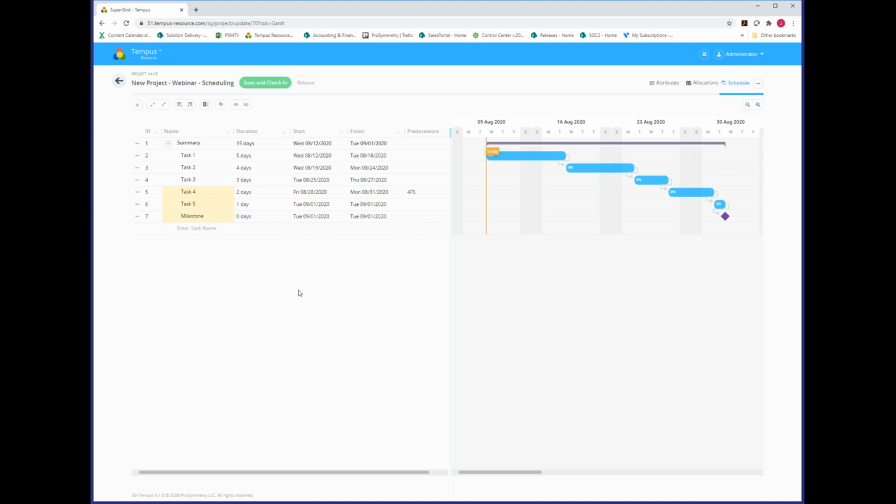But in any case, to illuminate your critical path, there is a critical path icon, again, directly above the task table, right? So you can see here this little sort of heartbeat type of indicator. And when we click on this, it'll illuminate those tasks which are part of the critical path, meaning those tasks whose date cannot change without altering the end date of the project. And now you see those illuminated in red, the commonly used color coding when displaying a critical path in a CPM generated schedule. So you can now see we can illuminate the critical path inside of the Gantt chart, right? That's another feature available to us.